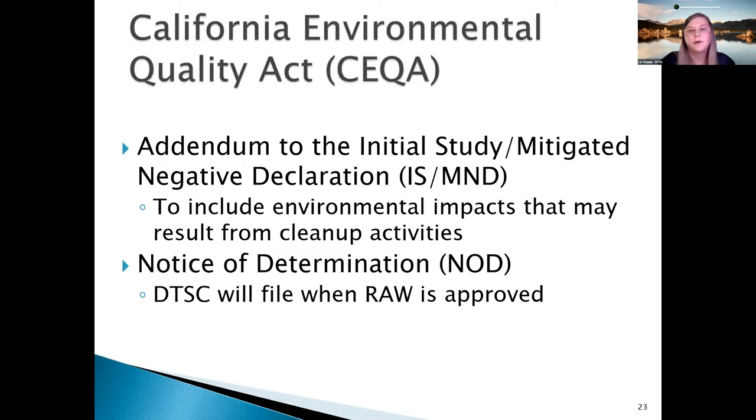So for the California Environmental Quality Act, or CEQA, DTSC is a responsible agency under CEQA, and as such, we have prepared an addendum to the district's initial study mitigated negative declaration, or ISMND, and that was to include any environmental impacts that may result from our cleanup activities into a CEQA document. Once DTSC is ready to approve the RAW, we will prepare and file a notice of determination. Next slide, please.